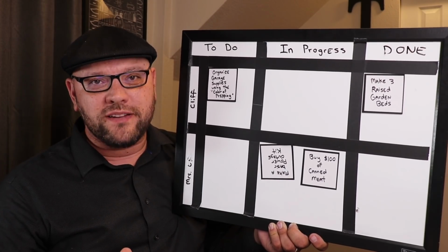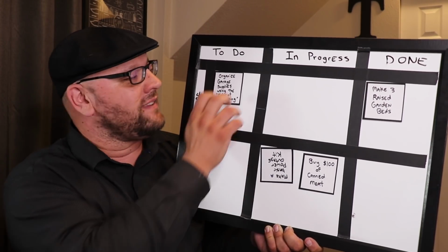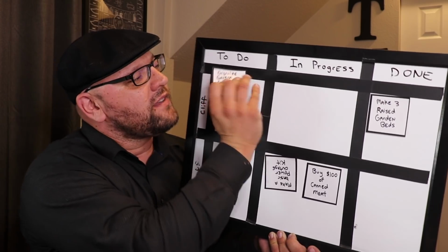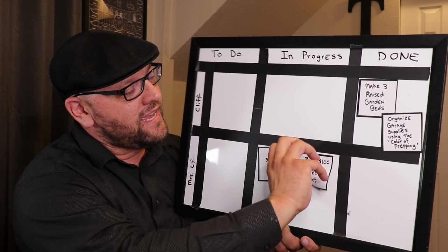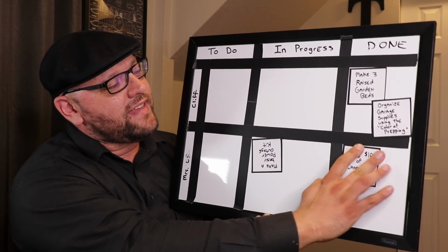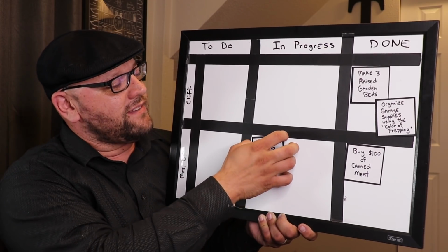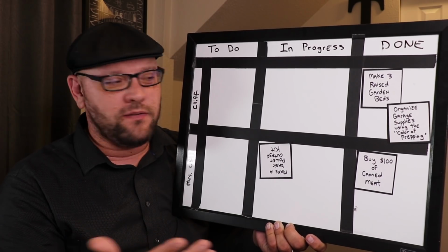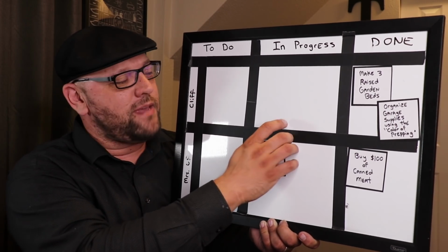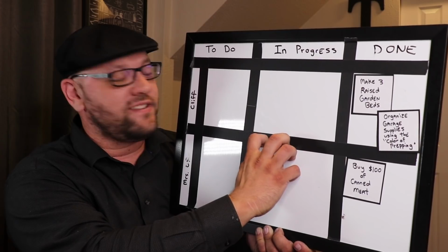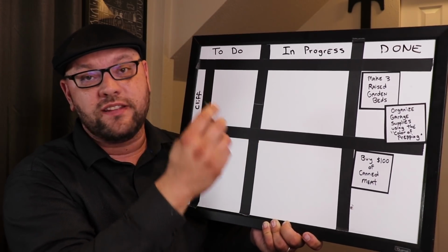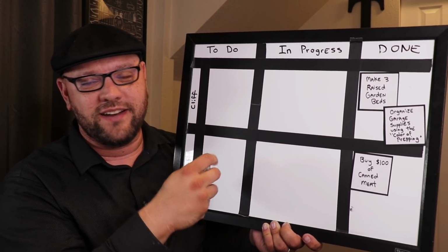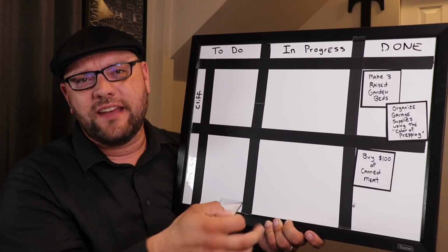A sprint retrospective meeting takes place after the sprint is done. So let's say the sprint's done, we worked on this, I got both of these done, and then let's see, Ms. Urban Prepper also got that done, but we weren't able to get that done. So what we do is kind of discuss what went well during the sprint, what was the problem. We'd say, hey, this one, we're out of this, maybe we should do this in the next sprint, or maybe we should just take it out of the next sprint and just put it in the overall backlog. We can't get to it because we're out of something like that. And you just kind of have a retrospective meeting.